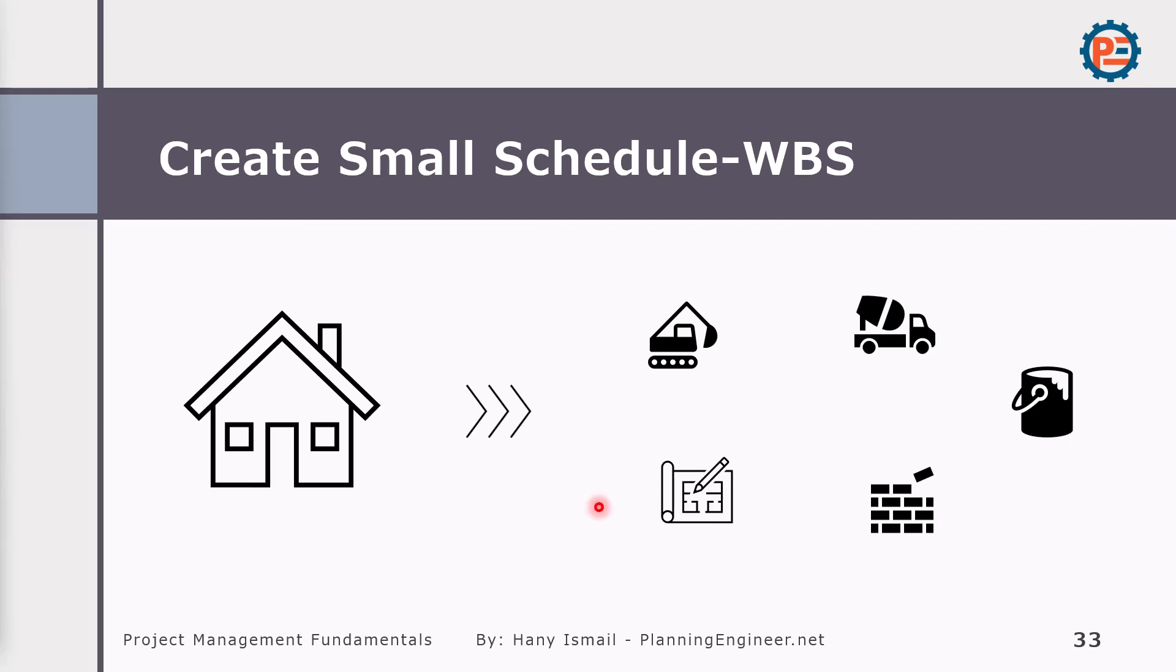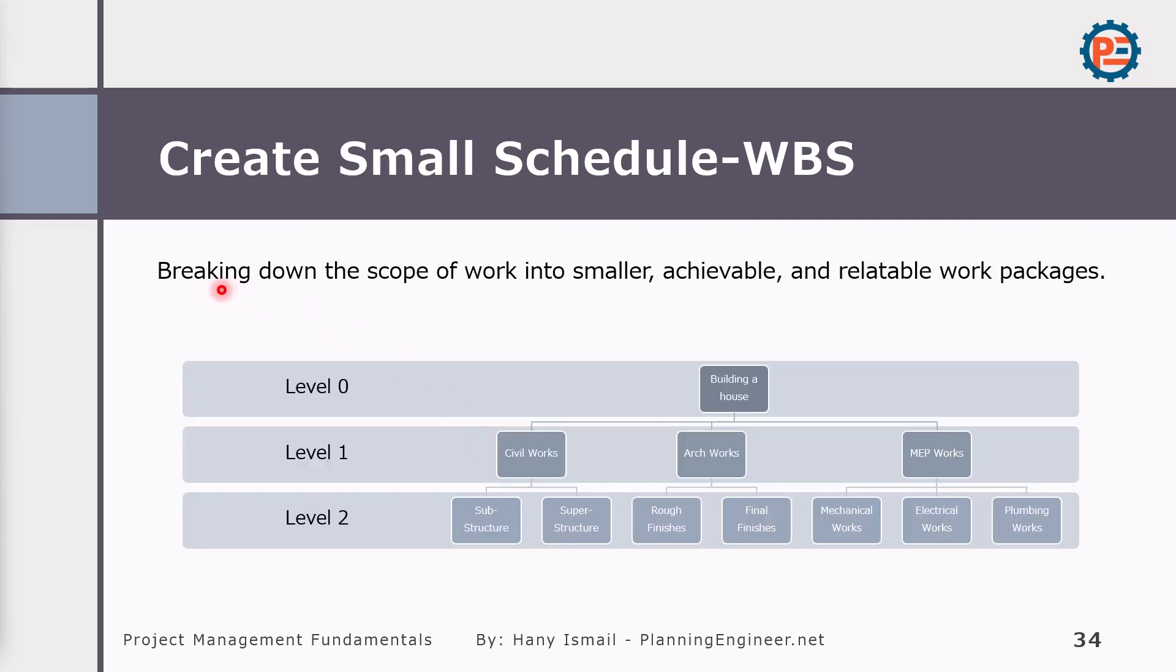WBS, let's say we are going to construct house. Can we manage constructing a house without decomposing the activities of the house into excavation, concrete, then drawings, then masonry work, paint and so on? So we make our WBS in order to be able to manage the individual tasks. If you say, okay, I would like to build a house and that's it. You cannot manage. You're behind because it is a very big scope of work you cannot manage. By doing WBS, we are breaking down the scope of work into smaller achievable and related work packages.